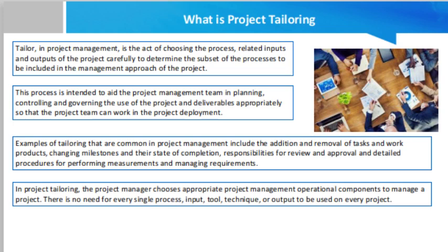These options are not overall terrible, but they are not as good as your own tailored methodology, which should be flexible and scalable enough to use on all your projects. So here are some signs that a project management methodology is not tailored correctly. Project team members are not using the methodology. Project team members are independently modifying the methodology. Your methodology features process for the sake of process. Your methodology is a one size fits all approach to projects of differing size and complexity.